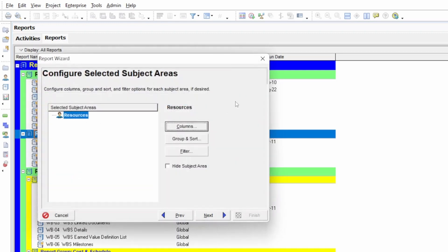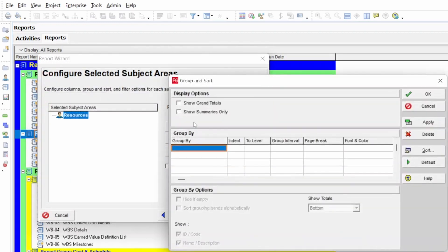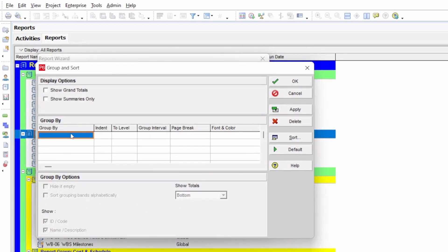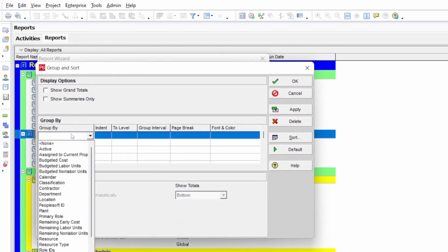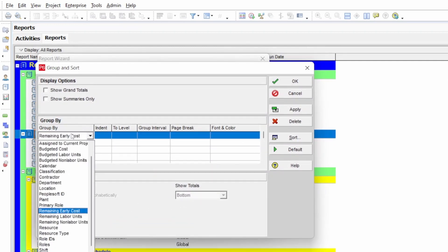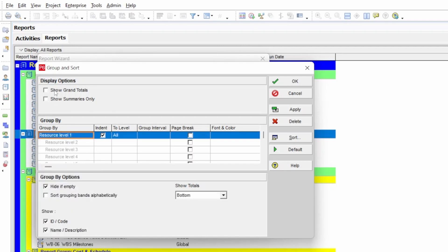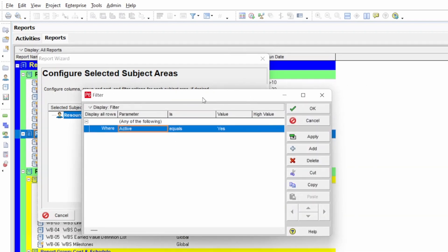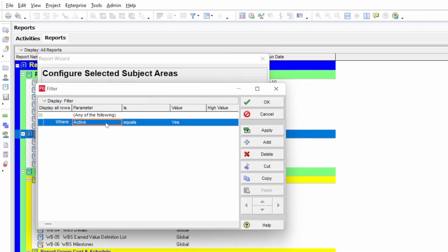Then go to 'Group and Sort.' Here you can see you need to group by resource — just press 'R' and Resource will appear. Select 'Show Grand Totals' and 'Show Summary Only,' then press Apply and OK. Next, go to 'Filter.' In the filter option, you can select by resource.